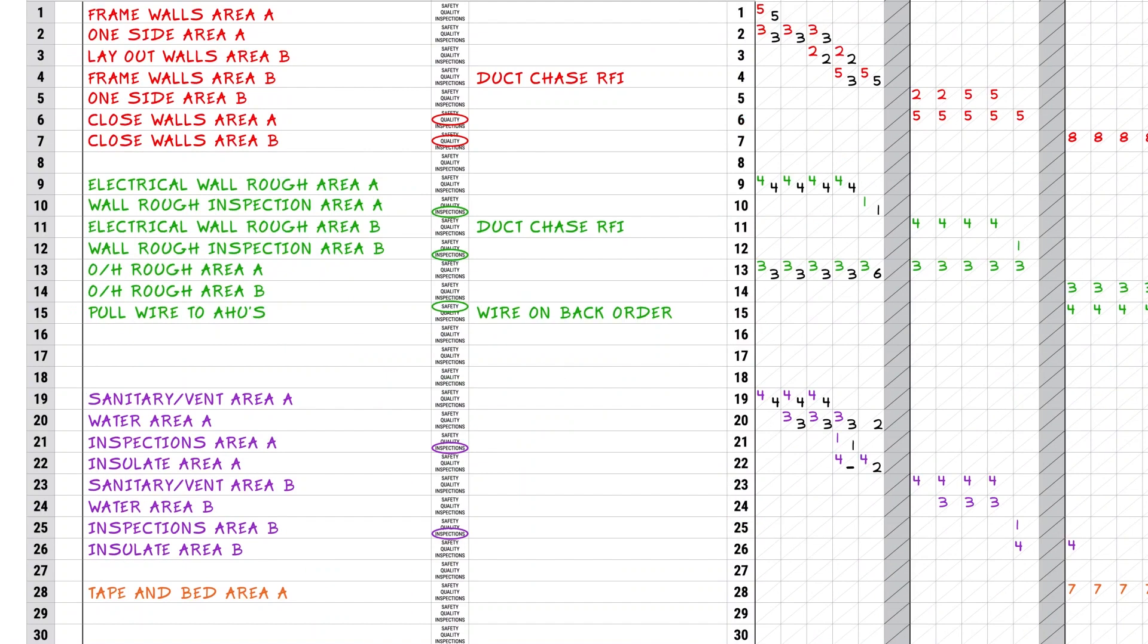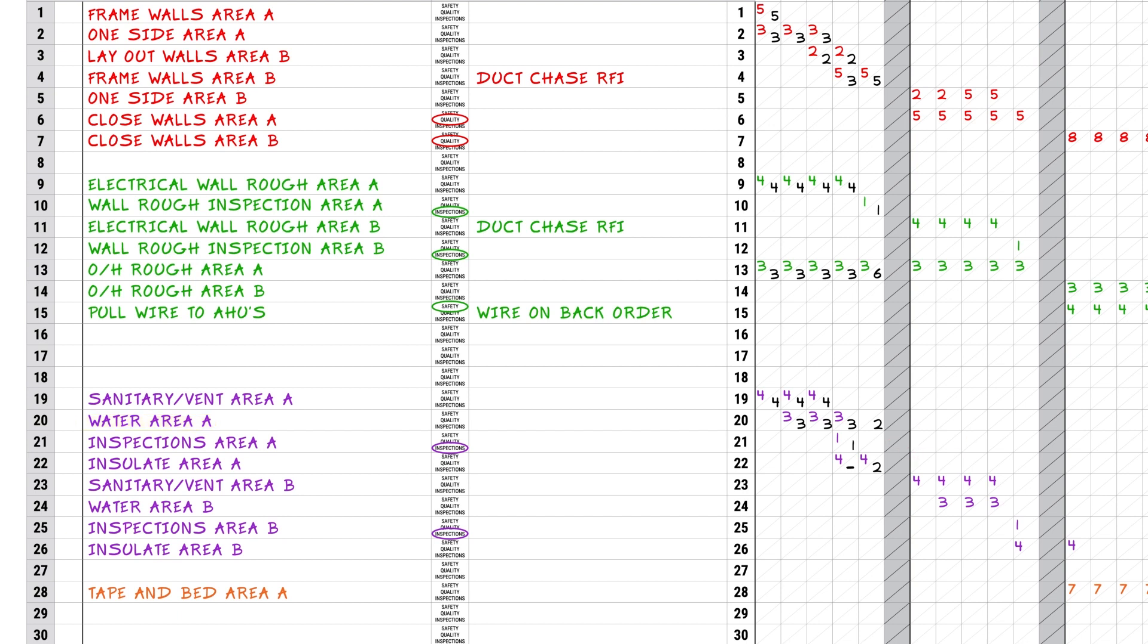However, the plumber did not pass his inspection of water area A due to pressure loss during the test, and now they have rework. The line item will need to be scored as no. The root cause, as we have determined, is a failed inspection. Although this root cause does not fit into one of the seven root causes listed, it should be labeled eight for other.